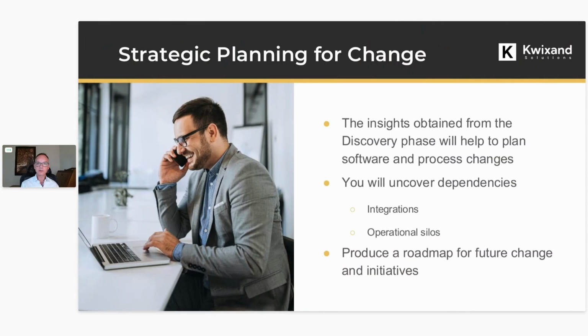So we'll propose a phased or agile deployment methodology, starting with an MVP, or a minimum viable product, for phase one, followed by cross-platform integrations, such as the D365 suite of products, like project services or CRM for sales as an example. That can be your phase two. What you're doing is essentially easing the end users into a digital transformation versus shocking them all at once by saying, here's your 15 systems, they're all online, now learn everything, right? You'll find that easing through the phased and agile approach, where they're seeing the incremental steps forward in the future state, will result in them fully adopting the system and feeling comfortable with what they're doing.